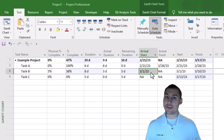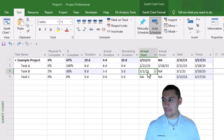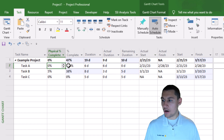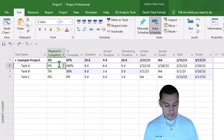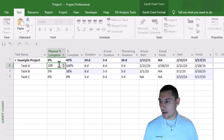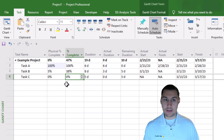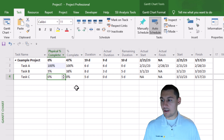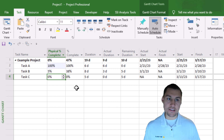With all that said, I want to mention two things that should always be true about physical percent complete. On tasks that are 100% done — completed and in the past — the physical percent complete should also be 100. And tasks that have not started and are at 0% complete, the physical percent complete should also be 0. We should not be saying we're in progress with a task that hasn't actually started.